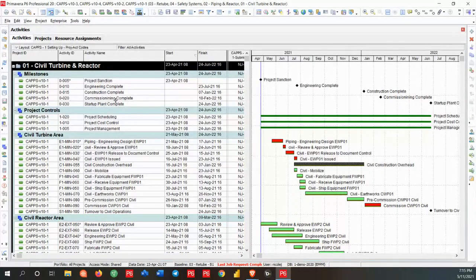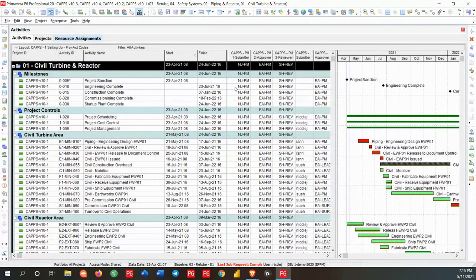Now, I'm flipping over to activities. So I've got those 4 projects open and I've got activities. And let me just bring this over so you can see. And I've got some coding on the activity. So this is letting you know who we're expecting to submit the updates. Okay, so you can have one or many people doing the updates within one project. It's totally up to you. Who's expected to approve it? Okay, so this is coming from the system. Let me explain that better.